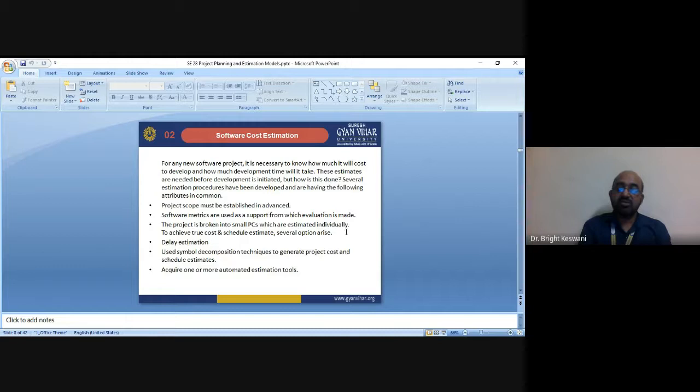When we talk about integration, that is the last phase, in the case of a small project, it will be 18%. In the case of an intermediate project, it will be 22%. In the case of medium, it is 26% as recommended by Boehm, and in the case of a large project, integration is recommended at 30%. So this is the phase-wise distribution of schedule as suggested by the COCOMO table.